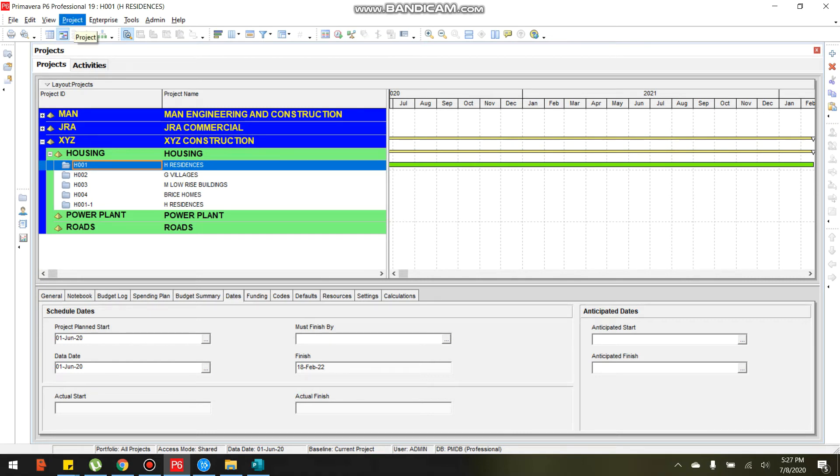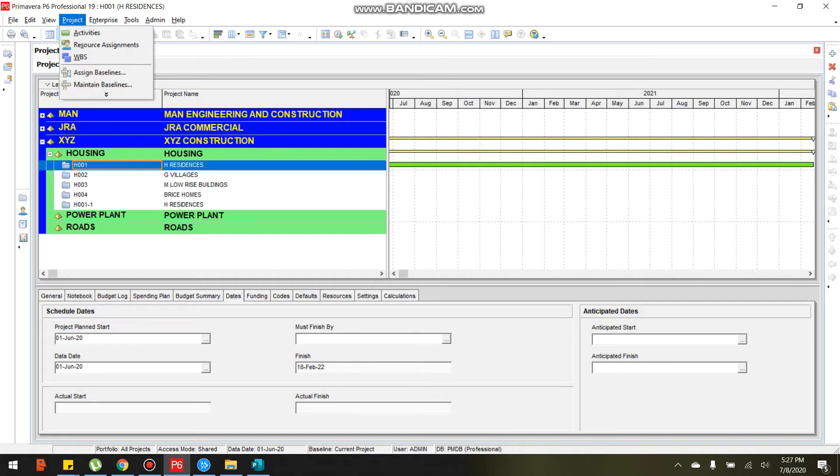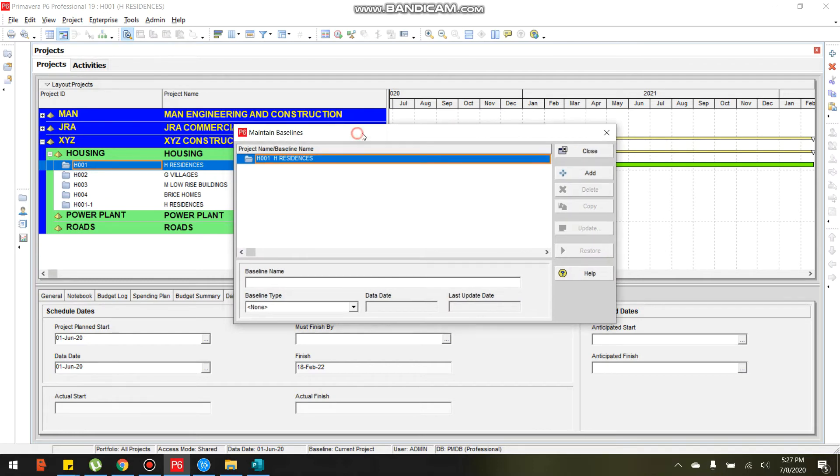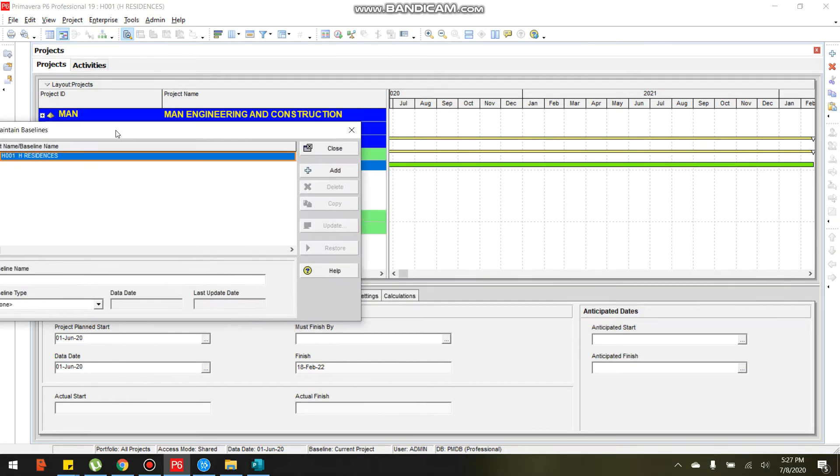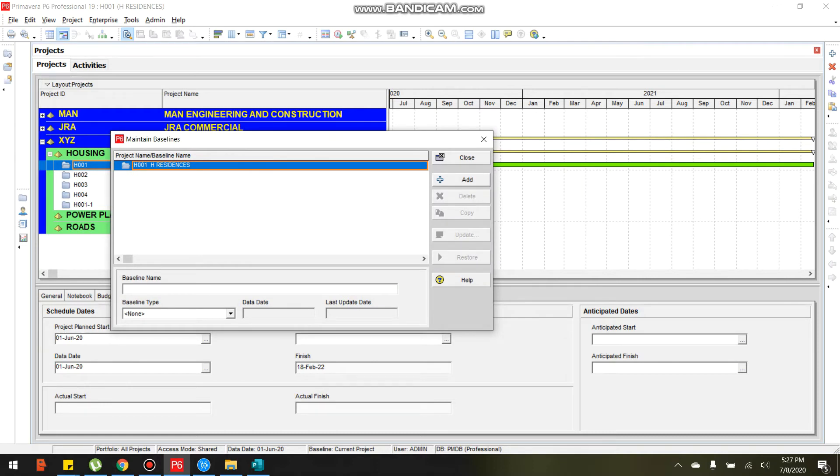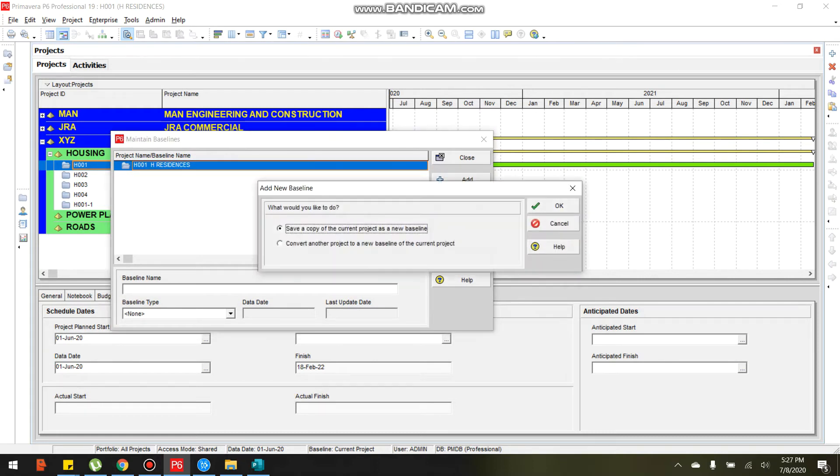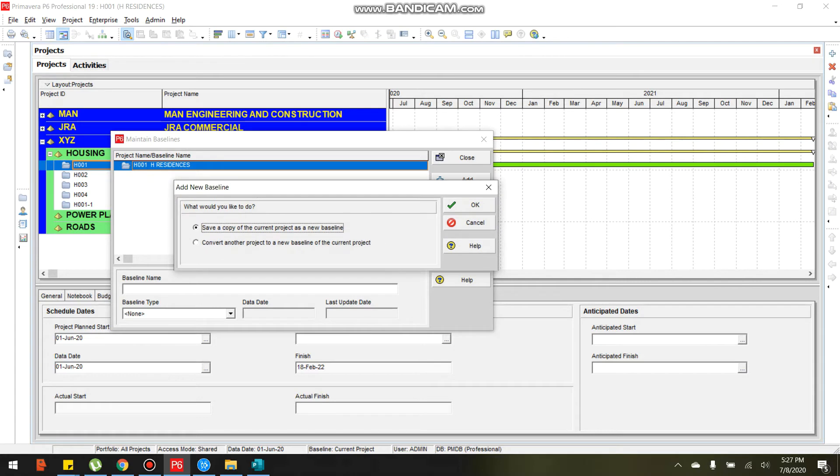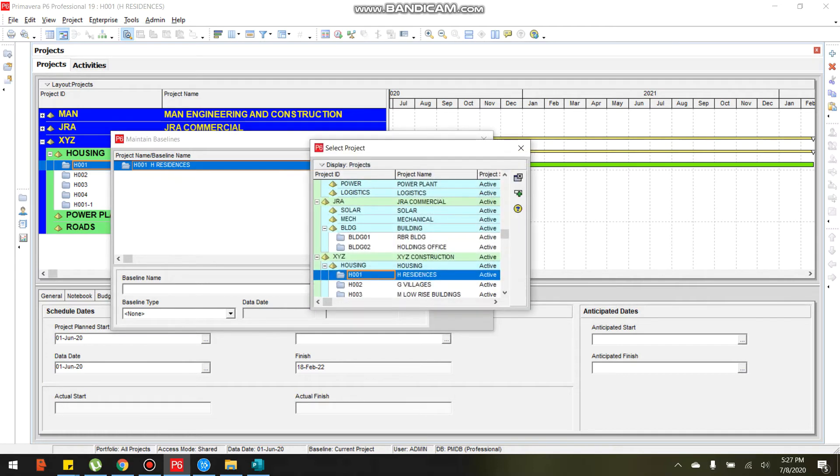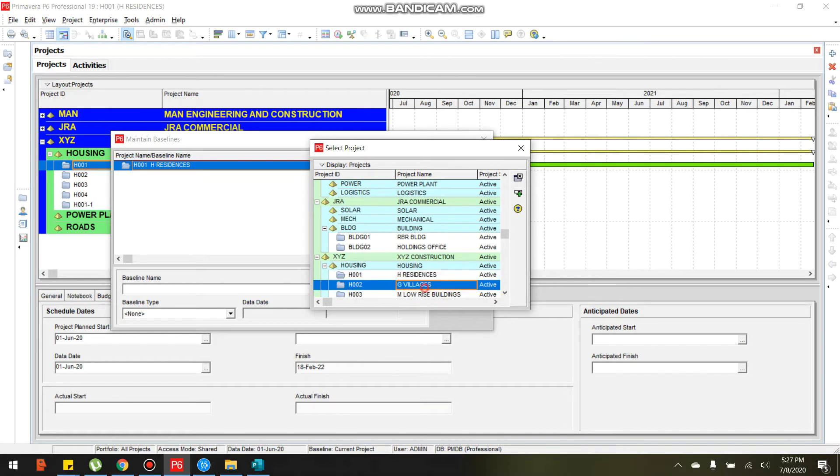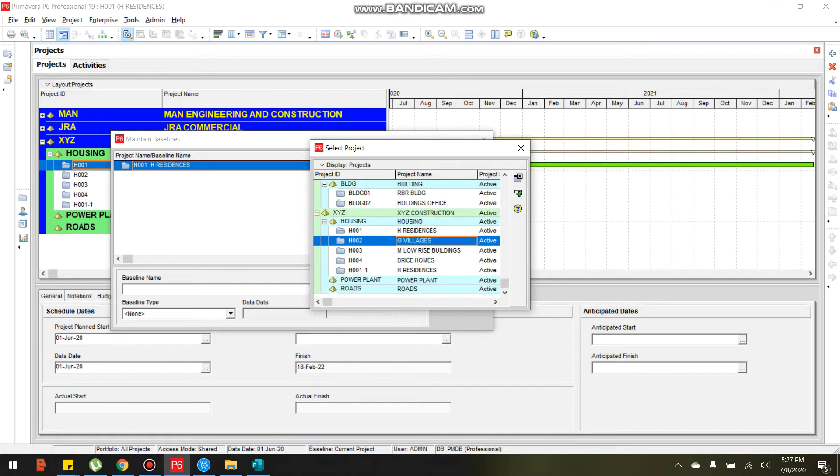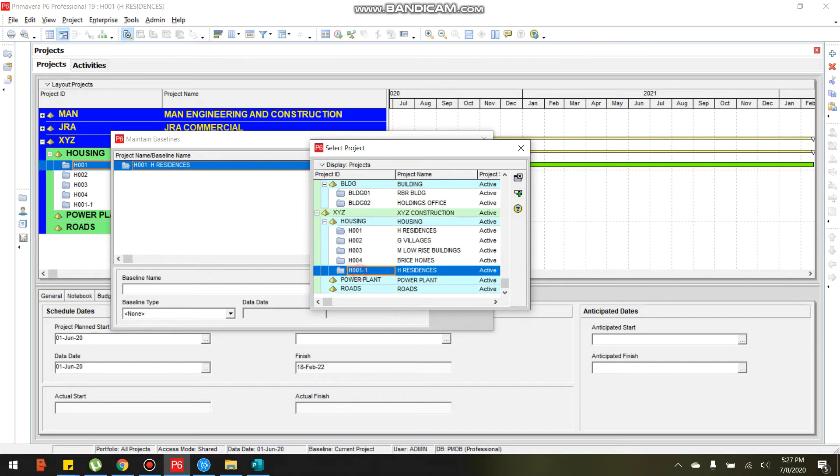Click only one project. Let's create baseline. Project in the menu, select project, maintain baseline. The maintain baseline dialog box, click add. The add new baseline dialog box, select this one, convert another project, new baseline of the current project. Click OK. Select the copied one of 8001-1, click add select.